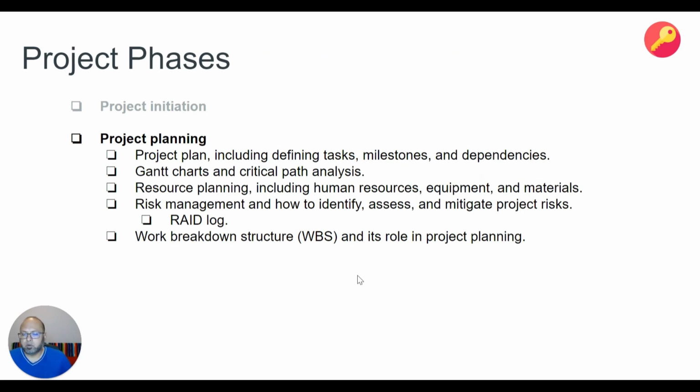i.e. if it's done within 2 weeks, you've got some time on your hands. If it takes more than 2 weeks, it's going to fail, because that's a critical path. That's what we mean by that. So identifying those critical path dependencies and the flow will help you see where you've got a bit of buffer to play with, and where you have no buffer, and therefore everything must finish on time.